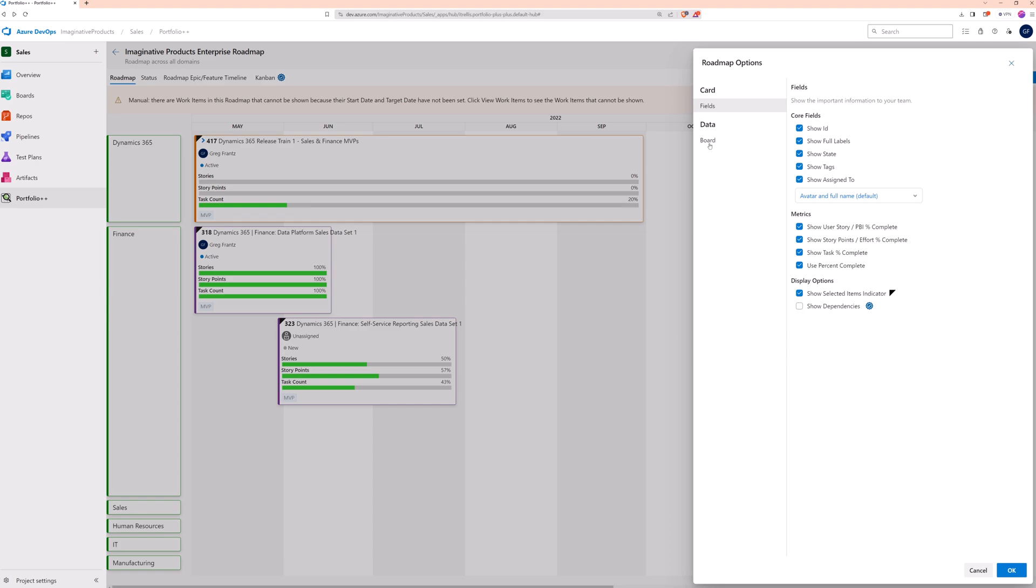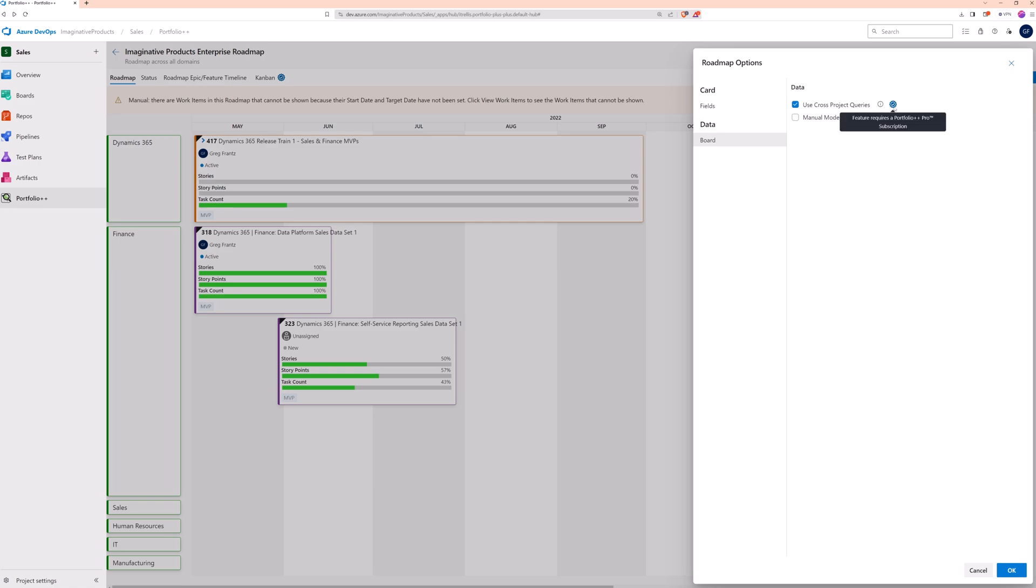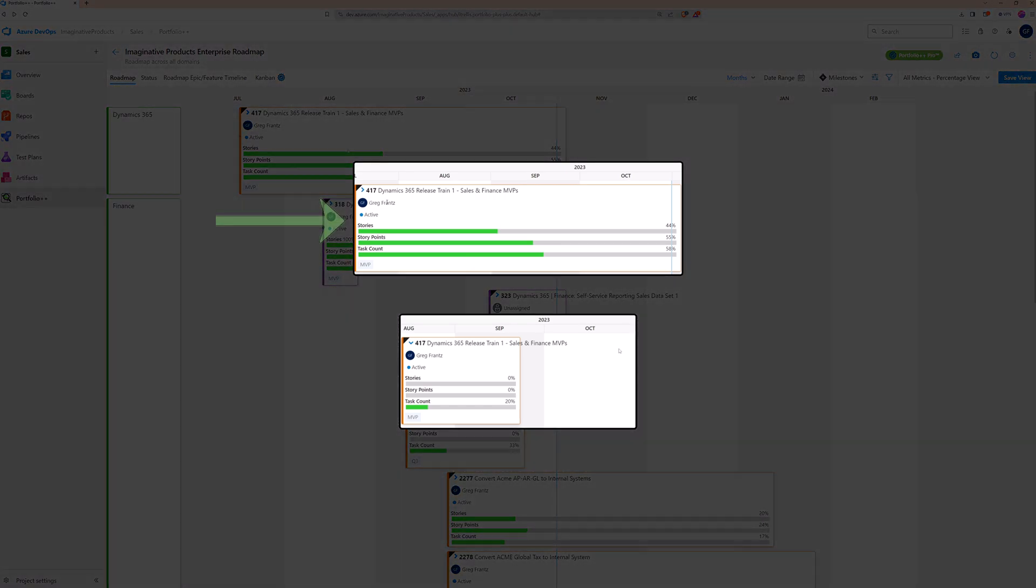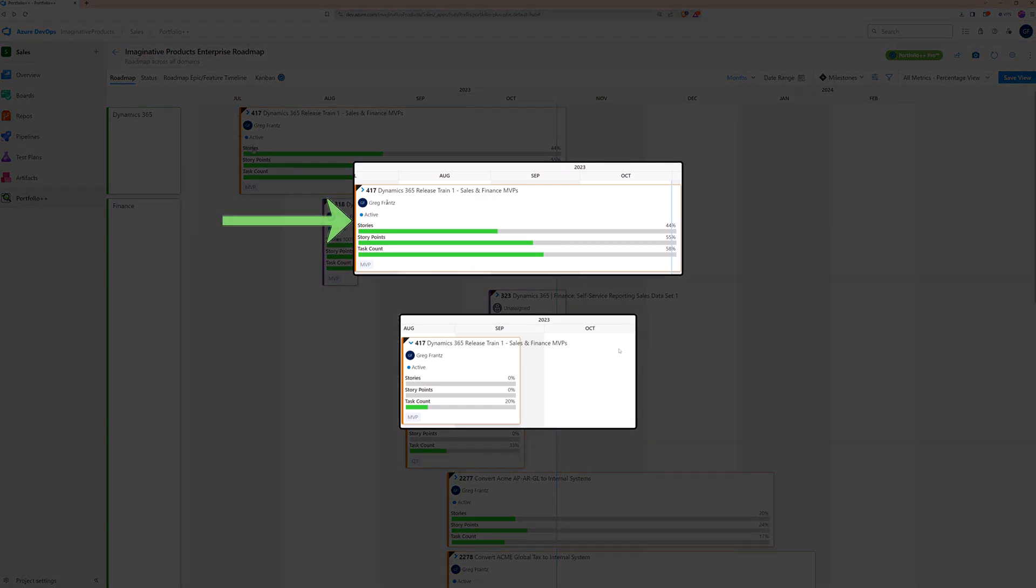Second, is cross project queries. This lets you see child work items from different project areas. If we turn it on, notice that the duration of this dynamics card is longer and the metric values are different. This is because there are child work items outside the dynamics project.